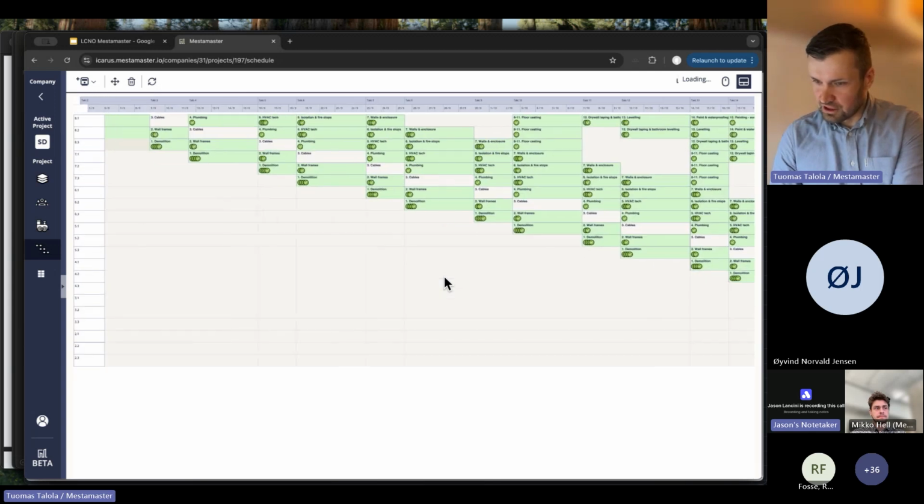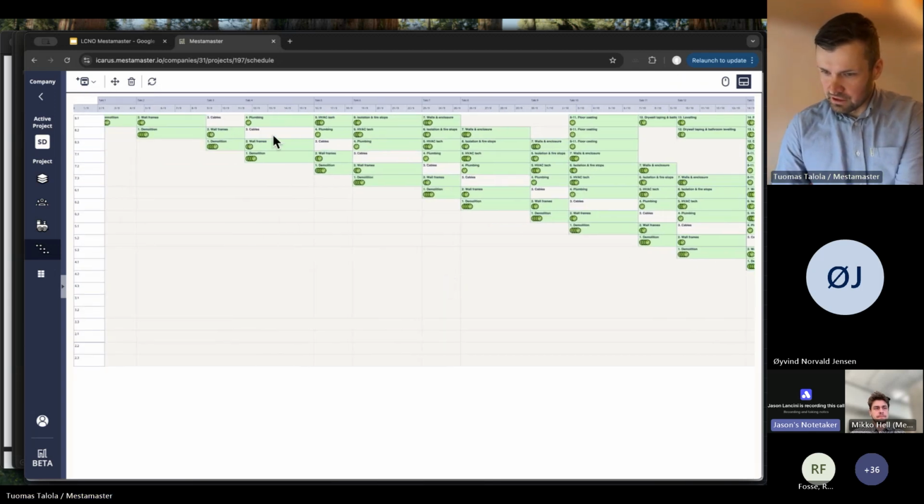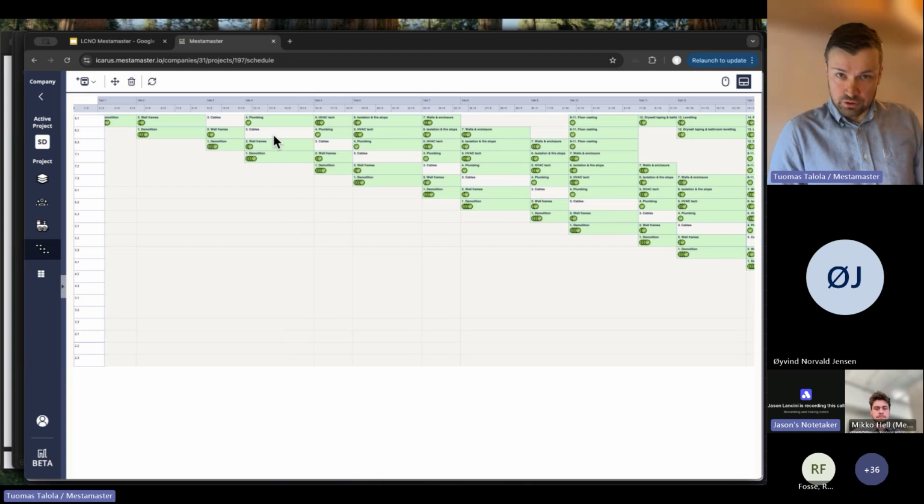As you can see, now in each space where we have applied this Takt train, the third wagon has become empty, so it's sort of like a buffer wagon. So if there's a need to edit the schedule, it's very easy to edit the schedule on each workspace. You don't have to do it separately on each train, which of course you can do.